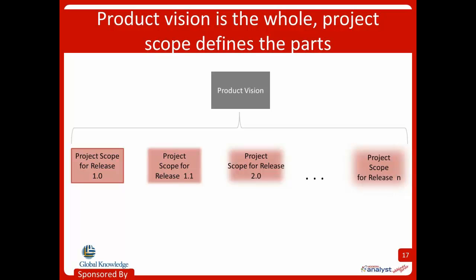But the point is the thing that I'm working on now, that scope boundary needs to be very, very clear. And as I look forward, it's less clear. Okay? So what you can do in any of these approaches to your development methodology is to build a roadmap for subsequent releases. Plan the scope statements are going to change over time, though. And know, those distant ones are going to be fuzzy. So just expect that kind of uncertainty as you look out into the future.